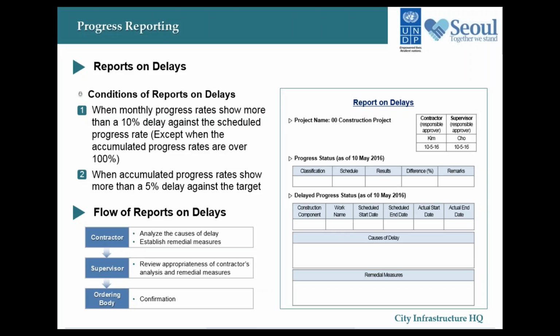So basically, all of the things that I described to you just now are mandated by Korea's national law, namely the Construction Technology Promotion Act. What the Seoul government has done is, building upon this legal system of delay reporting, they have installed a specific menu in one PMIS dedicated to reports on delays. And then these delay reports are compiled and permanently stored in the system.